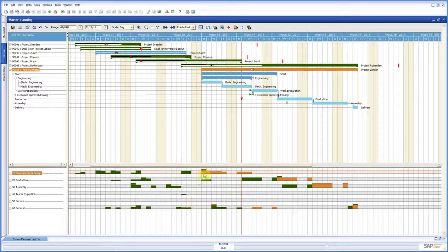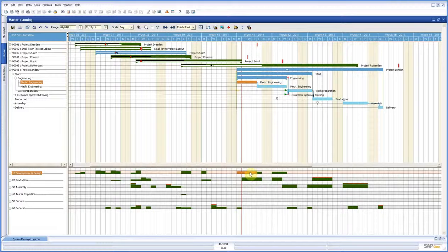Now, what do we see here? We see that you need capacity from this greenish project and from the brown one. So if we pick up the brown one here and we move that to the right, then we see it's working. If we move this to the right, you see also immediately that everything else goes to the right. And that's because of those blue arrows there.